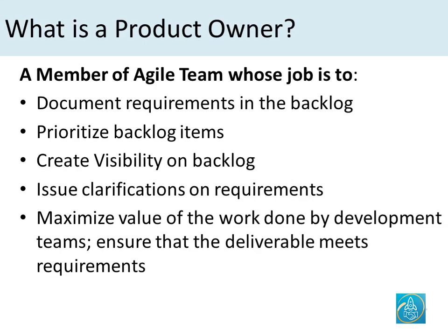So what is a product owner? A product owner is a member of an agile team whose job is to document requirements in the backlog, and that means writing up user stories with acceptance criteria and getting the design documents as necessary, making sure that all the items that capture all the requests from the stakeholders, be it bugs or feature enhancements, are captured in a product backlog and prioritized.